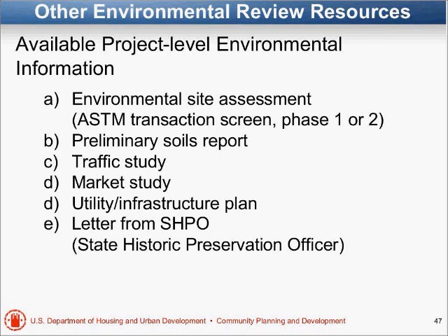Okay, not only information on the internet, but you're generally dealing with a sponsor. So you should ask them what type of information they have that could help you do your environmental planning, your environmental review. Have you already done your phase 1 or phase 2? If they have, you want that. If they've done a preliminary soils report, you want that. If they've done a traffic study or a market study, you want that.